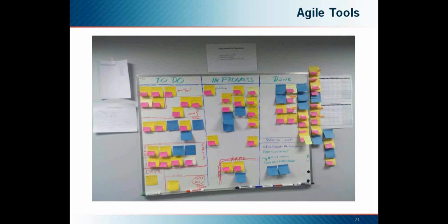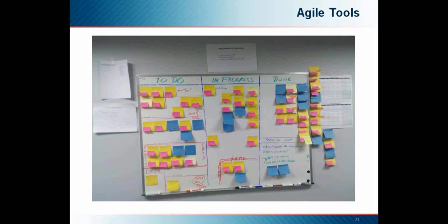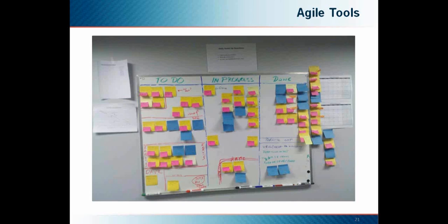We track the progress of the tasks simply by moving the tasks across the board. These are done by the individual team members, usually during the daily stand-up. The final category indicates items that have been completed and tested. The information on the Kanban board can differ between the projects. Here, the yellow tasks are planned tasks. The blue are new items that the team needed to focus on. By identifying these in flight, so to say, we can immediately determine the impact and plan accordingly.